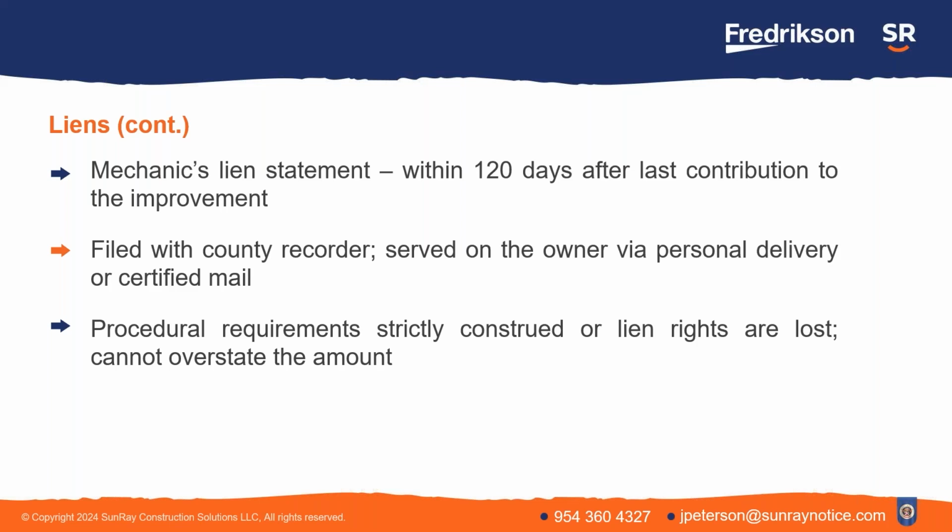If you think you're done with a substantial portion of your work, you got a little bit of punch list stuff maybe, don't rely on the punch list stuff to start your 120 days. It starts earlier than that.